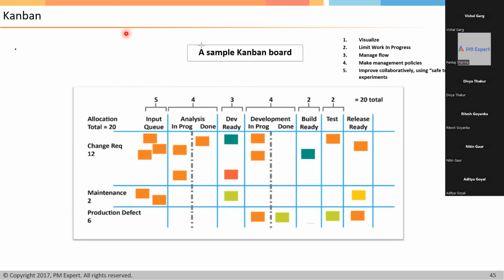But it is at its peak, right? 2 items are there. It doesn't show whether these are done or still in progress, right? So we cannot find out whether this is the bottleneck for us. When the testing is done, it moves to release ready, right? So we cannot find out whether this is done or not. Testing is in progress, this is what it shows. Correct. Having a Done column will give us a clear picture, basically visualization.